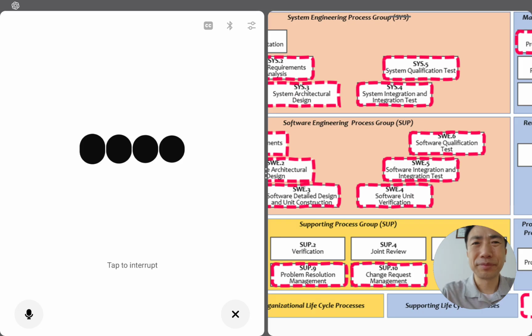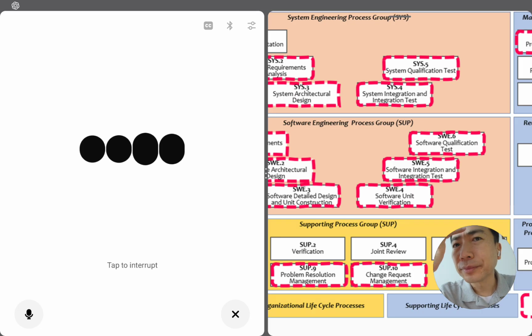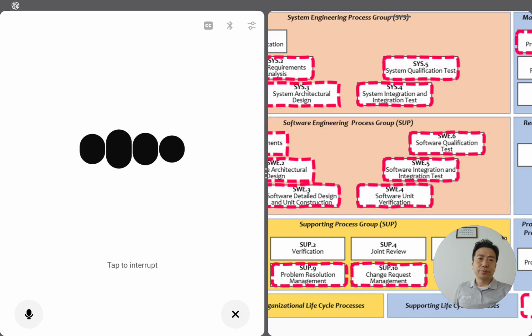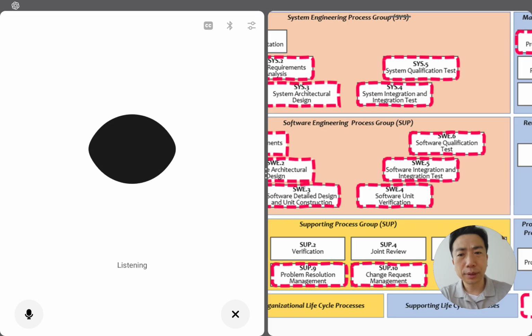That sounds fine, David. Every company can adapt the wording of those states to fit their workflow. ASPICE doesn't force exact labels. It just cares that you can track progress clearly and show that each change moves through defined stages. Your flow, open, in progress, resolved, closed, actually makes sense. In progress shows action is underway. Resolved shows the fix is complete and verified. And closed means the record is officially finished. As long as each step has clear meaning and evidence, your version works perfectly.